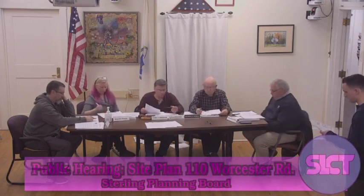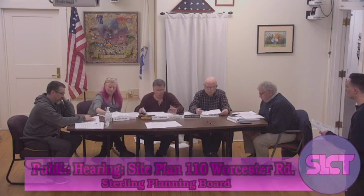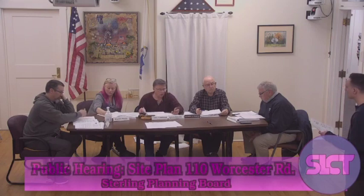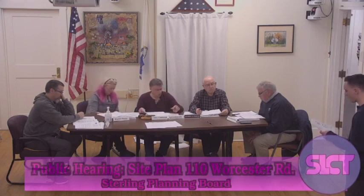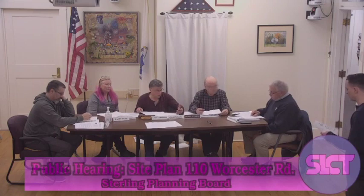Another thing, there's no calculations on your plan as to how anybody arrived at that. What are they calling that space? Is it office space? Is it manufacturing space? Is it warehouse space? We don't know the calculations used in arriving at the 10 spaces. Typically on our plans, there's a box that shows what category requires how many spaces, and that's what we use to determine if the calculation's correct. We don't see that, so I don't even know if the 10 is the correct amount.